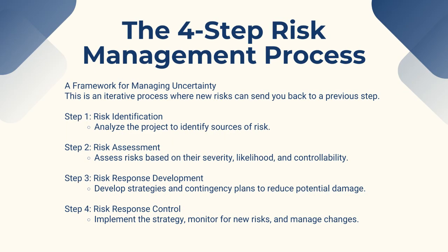To manage risk effectively, we follow a structured, four-step process. Think of this as our roadmap for the entire risk management effort. First, we have Step 1. Risk identification, where our goal is to analyze the project and identify all potential sources of risk. Next is Step 2, risk assessment. Here, we evaluate those risks in terms of their severity, the likelihood of them occurring, and how much control we have over them.